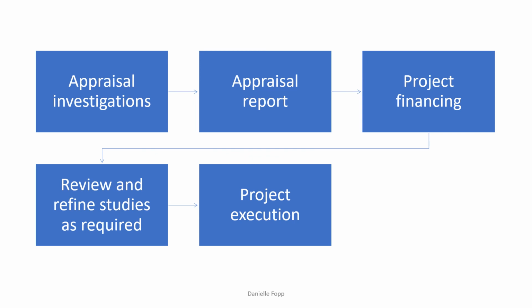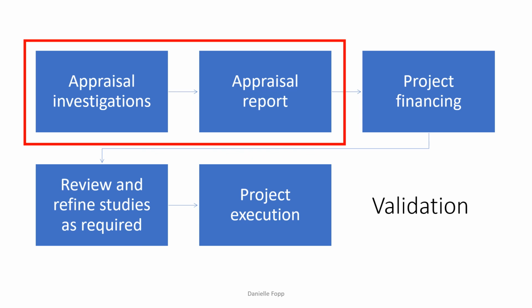Now in the validation stage, the appraisal involves a careful checking of the basic data, assumptions, and methodology used in the project preparation. It also involves an in-depth review of the work plan, cost estimates, proposed financing, an assessment of the project's organisational and management aspects, and finally, the viability of the project. And in this course, we will work through what is involved in these appraisals. And as you can see on screen, this is the validation of work done to date.